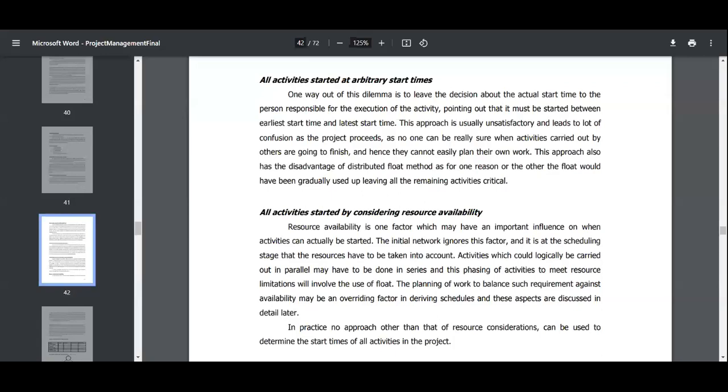B is different work, so it has just started. And as per the management rules, as per management ethics, C should inform his manager or boss via mail. He says, due to this work pending with A, his work will start and complete later. So whatever time you allotted me, it's not possible to complete it because of this reason, so I will require another time, right? That is the perfect reporting for any project.